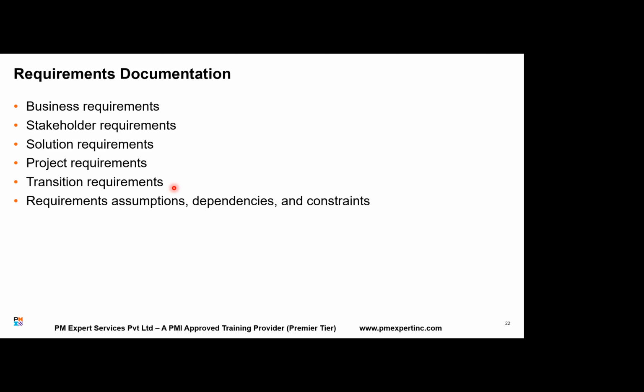Another example could be, suppose you are migrating from old legacy systems to cutting-edge technology. For some time, you have data in both the systems, so that you ensure that the new system is stable.